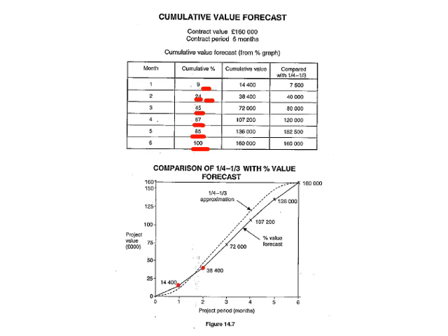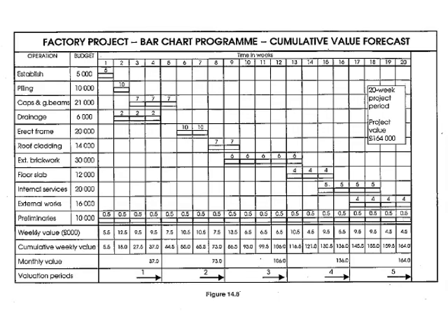Then you just plot your expenditure on your graph, and you draw in your graph to get to your percentage spent, and you can see they actually put in the S-curve, and the S-curve is more or less in there, but you can see there is quite a bit of a difference. More or less here in the middle is where you will have a big variance. So you can see that you will have a lower cash flow or expenditure on a project than the S-curve would suggest.